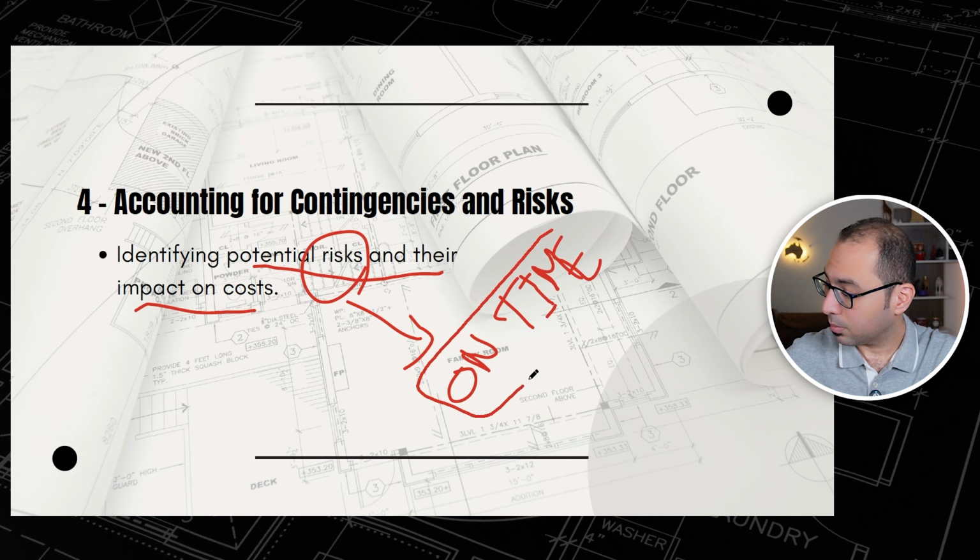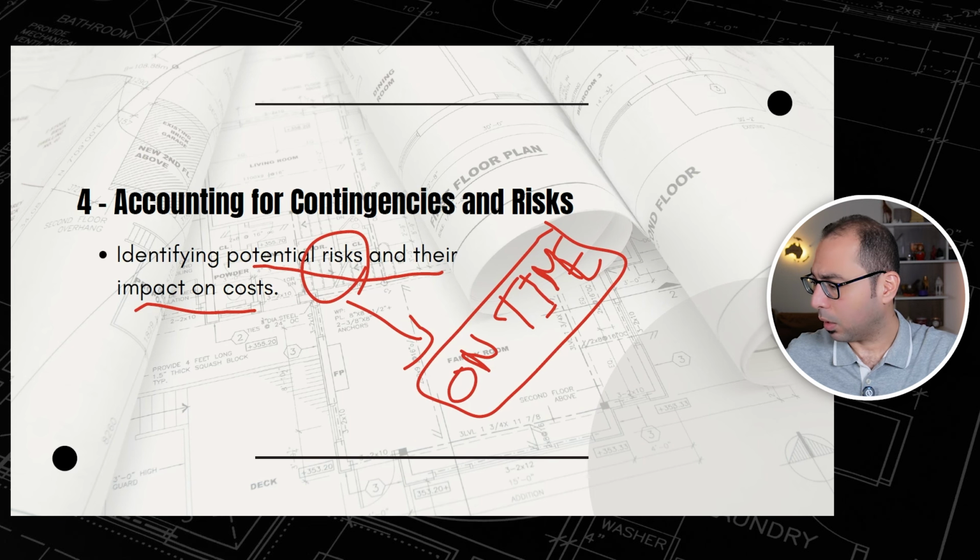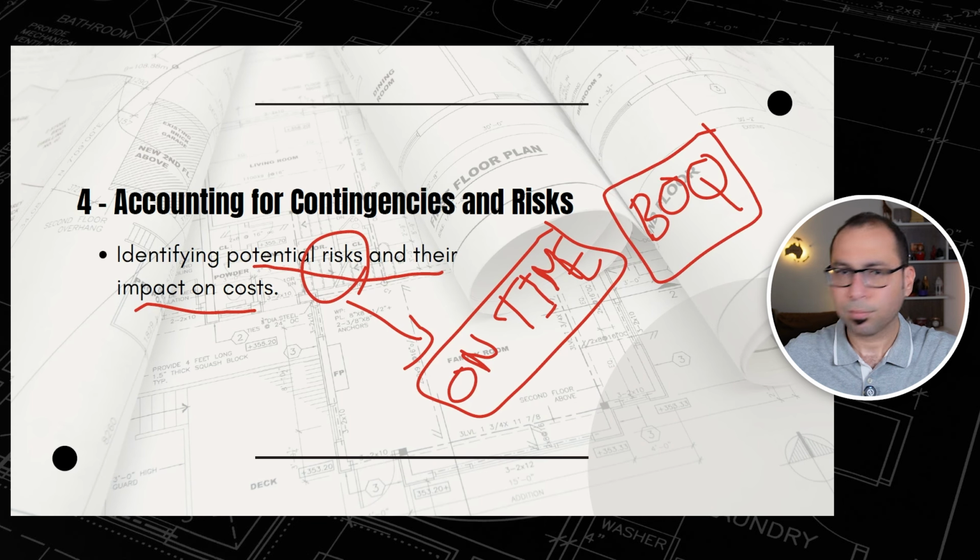This is one of the risks that you might encounter in a project. Now, you are pricing and estimating the cost, and when you know that this risk might be there, there are some countermeasures you should take. For example, maybe BOQ front loading, so you are giving higher weightage to the items that come at the start of the project. Why? Because the client will not be paying on time, so you need to get a big amount of money in the beginning to keep your cash flow healthy and finish the project. So this is a potential risk.